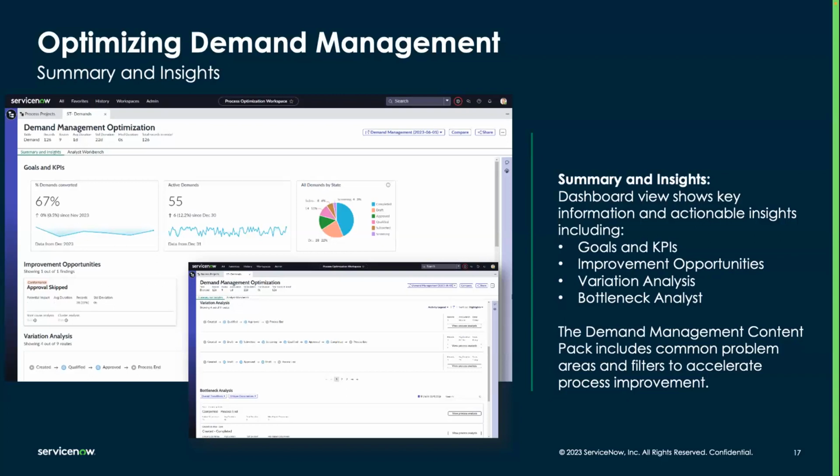And we're also providing some example finding rules in terms of how we look to identify improvement opportunities. So looking to establish where demands are going through the process and going through repeated rework loops, maybe where we're actually taking a demand and converting it into a project without going through an approval, all those sorts of areas which we need to stamp out, because that's not adhering to what our designed path would be through the solution.